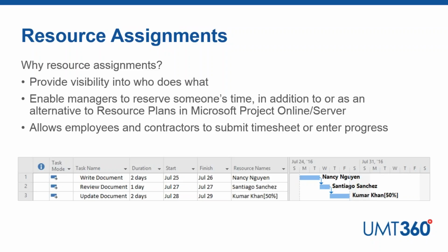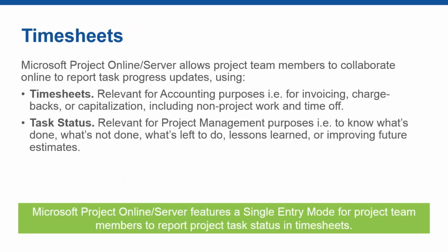Okay. Now, talking about timesheets, there's actually a very fundamental difference here. Within the Microsoft platform, you have the ability not only to submit timesheets, but also just to enter task status. And they really serve two fundamentally different purposes. Timesheets typically are used for accounting purposes. So for example, if you need to run invoices or chargebacks or do capitalization, and timesheets typically also include non-project work, maybe ongoing support, time off, and so forth.